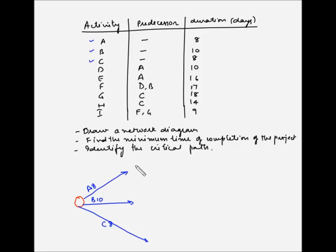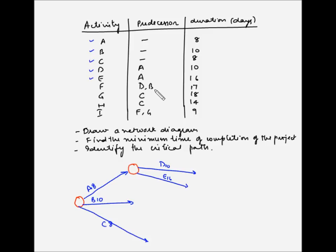Next are D and E which are dependent on A. This is the ending node for A, and from here we draw D and E. D takes 10 days and E takes 15 days for completion. Next is F which is dependent on D and B. D is here and B is here, so D and B will have to merge into one node and then from there we take out F.